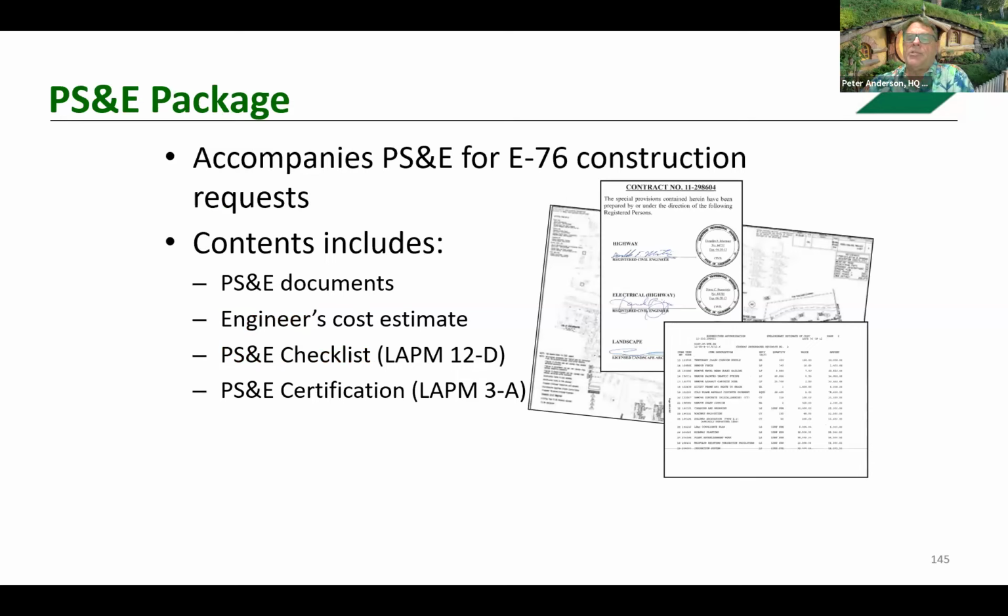The PS&E package is required to be submitted with the construction request for authorization. It'll include the PS&E documentation, the project's plans, specification, and estimate, the PS&E checklist, and the PS&E certification, which has been incorporated into the 3A.